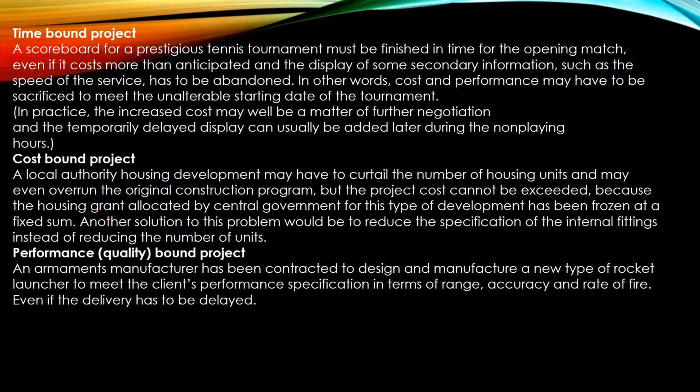It must be finished on time for the opening match, even if it costs more than anticipated, and the display of some secondary information, such as speed of the service, it has to be abandoned. In other words, what we're talking about over here is that the cost and the performance, they may have to be sacrificed to meet the unalterable starting date of the tournament.